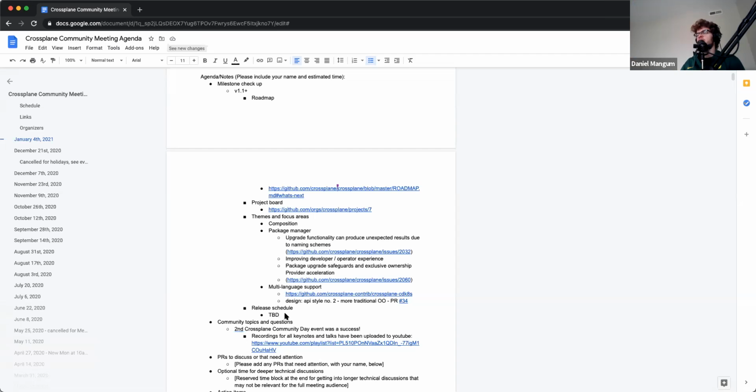Yeah, another thing to note there is the 6 weeks would be for a new minor version, but we should have patch versions whenever they need to go out, right? So we could be releasing those every day if we needed to. So something to keep in mind there.